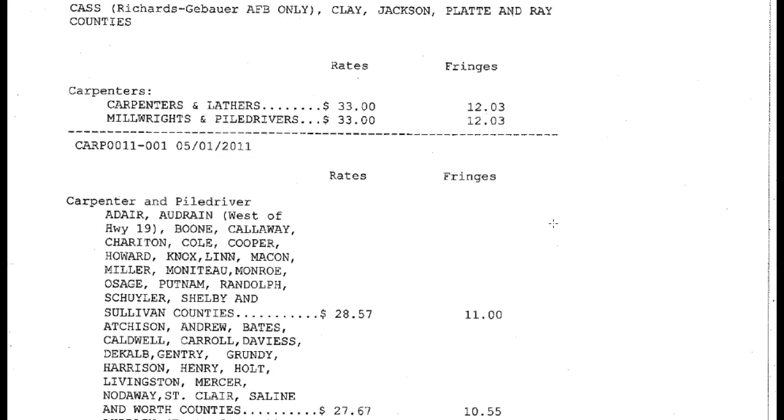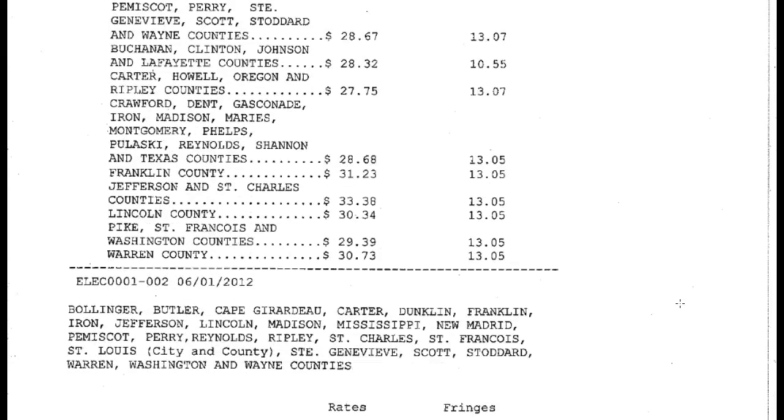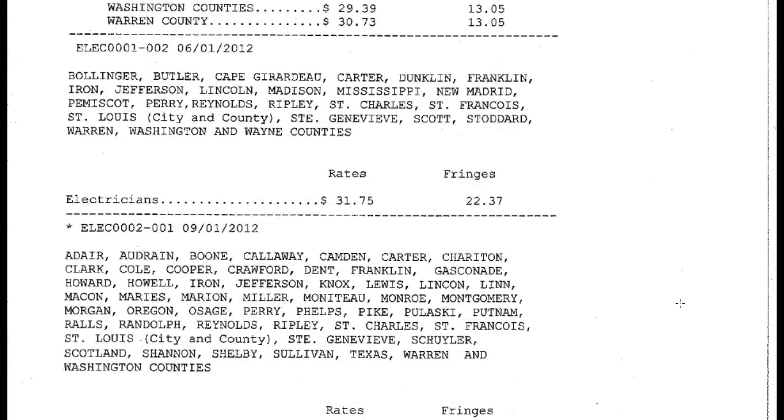You'll go down through the wage rates. You'll see another section here of carpenters and pile driver workers for other counties in Missouri. You'll see all the different counties should be listed and the different rates, and you can see how the rates change as you go out to the more rural areas, where labor tends to be generally a little less expensive. So you'll go down through this wage rate, find Jackson County for all the different types of work.